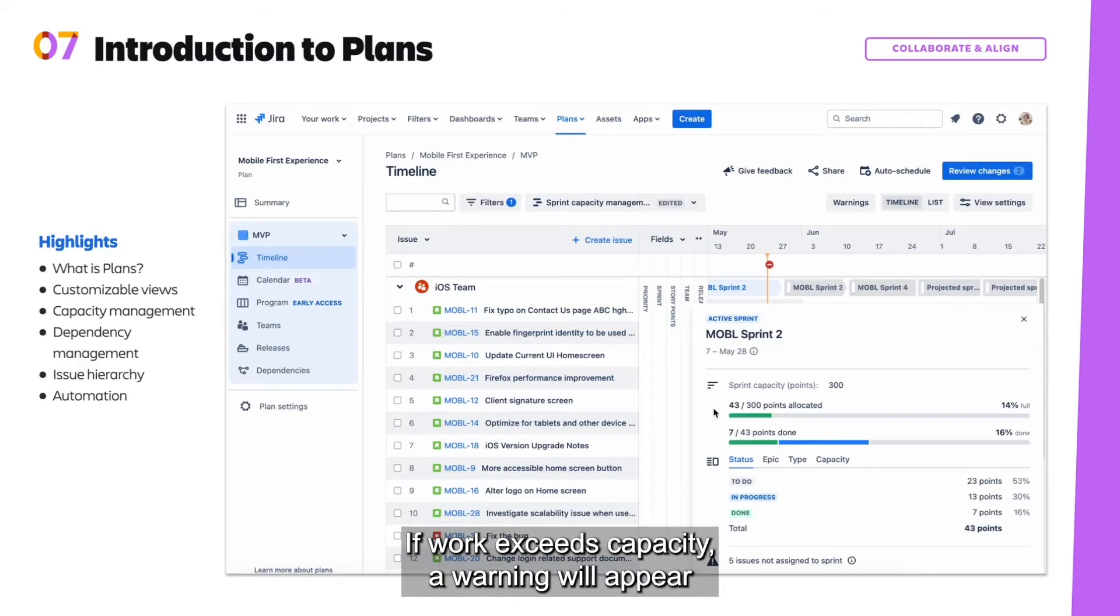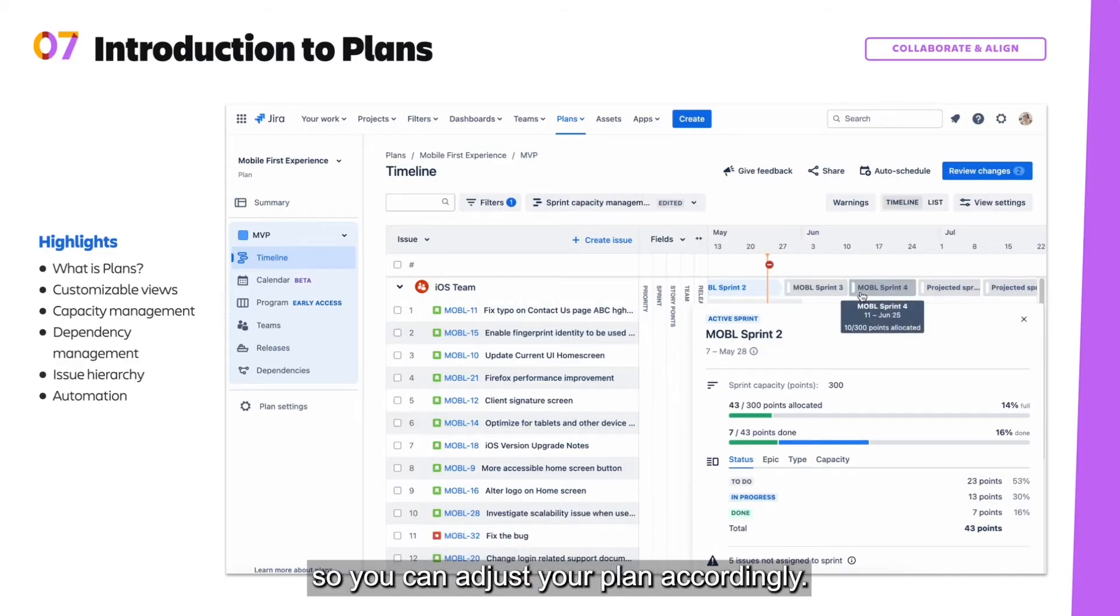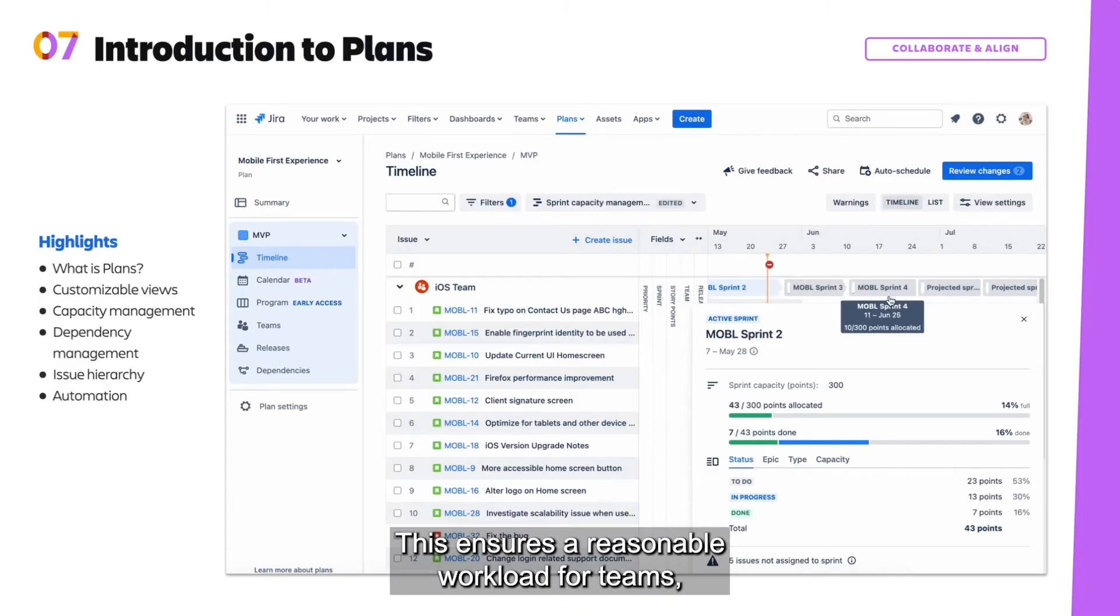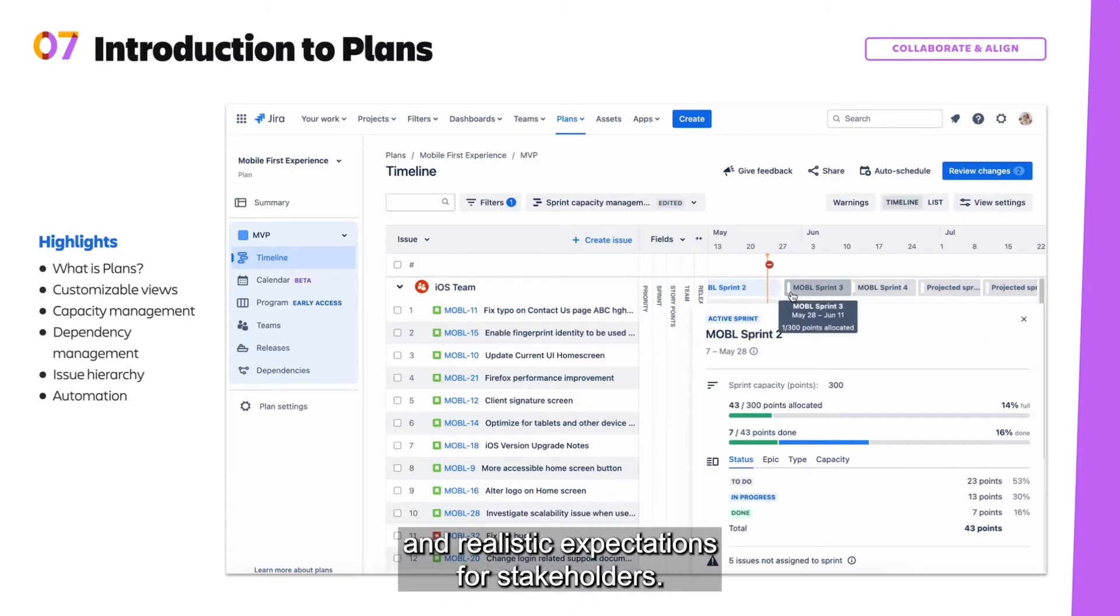If work exceeds capacity, a warning will appear so you can adjust your plan accordingly. This ensures a reasonable workload for teams and realistic expectations for stakeholders.